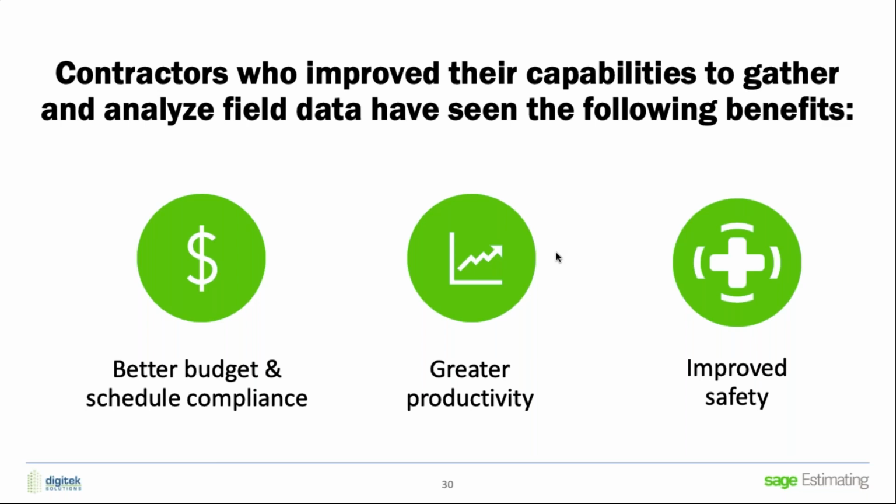It's not necessarily their fault, but I go to the employees, the ones that are doing the work, the craftsmen, and I say, what's causing slowdowns on this job? They'll identify them to you. The problem is that information doesn't always make it up to the project manager level, or certainly not to the estimator level. Well, if we start to fix that with them because they really know what's going on, and it gets to the super and he can fix that because we've identified it, that increases our productivity.